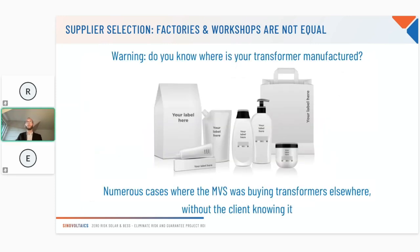And actually it's a question I want to ask our audience, an action for you to take away from this webinar: do you know where your transformer is manufactured? Because we see, as I mentioned, more and more cases where the client was buying, for example, a medium voltage station from supplier A, but actually supplier A was buying all the transformers that would be put into the medium voltage station from another company. And of course, the client was not aware of it. It's something that we have found out as part of the audits. So yeah, it's one point I will strongly advise you to check as part of your next projects.